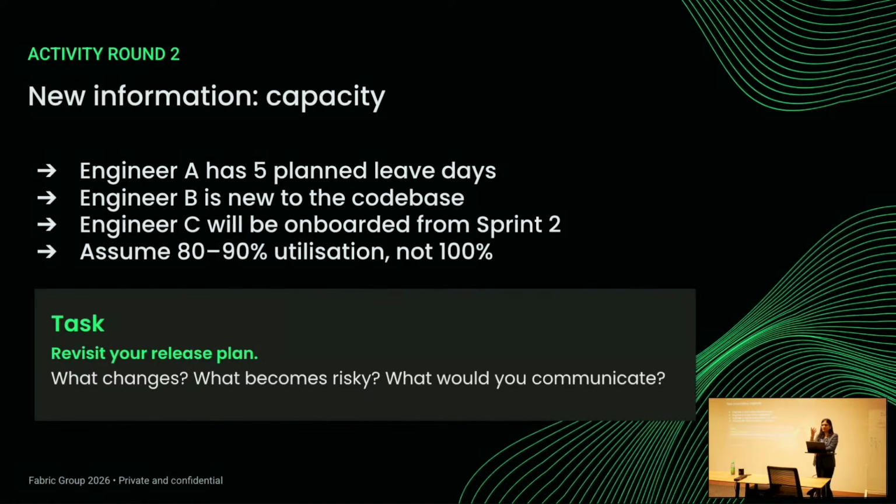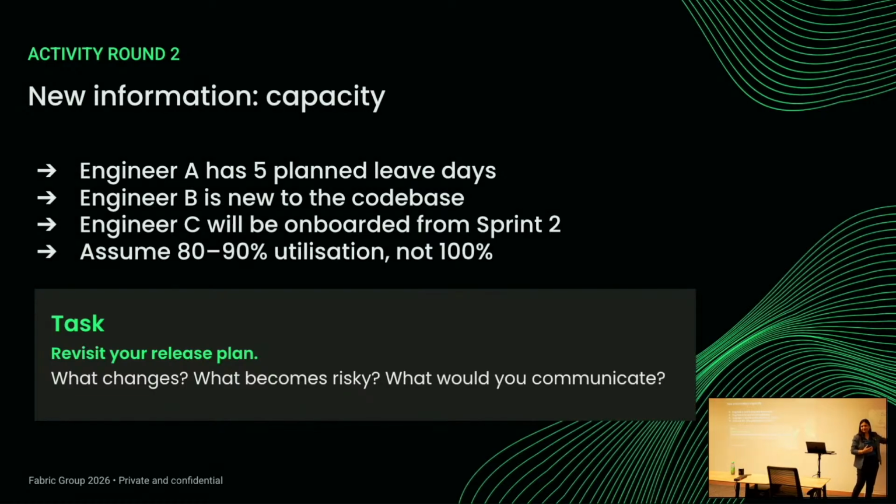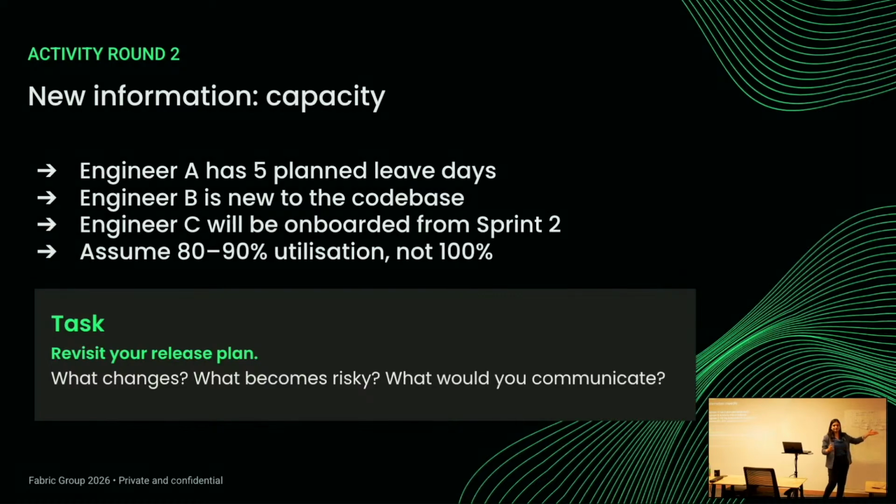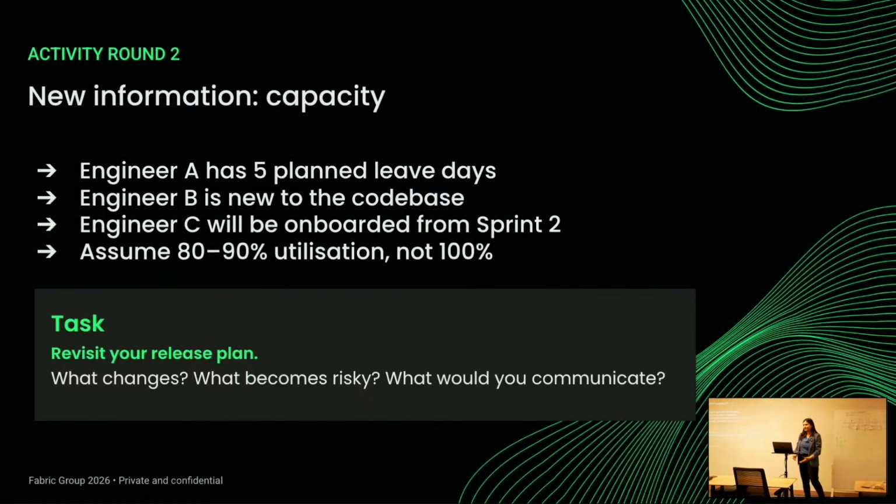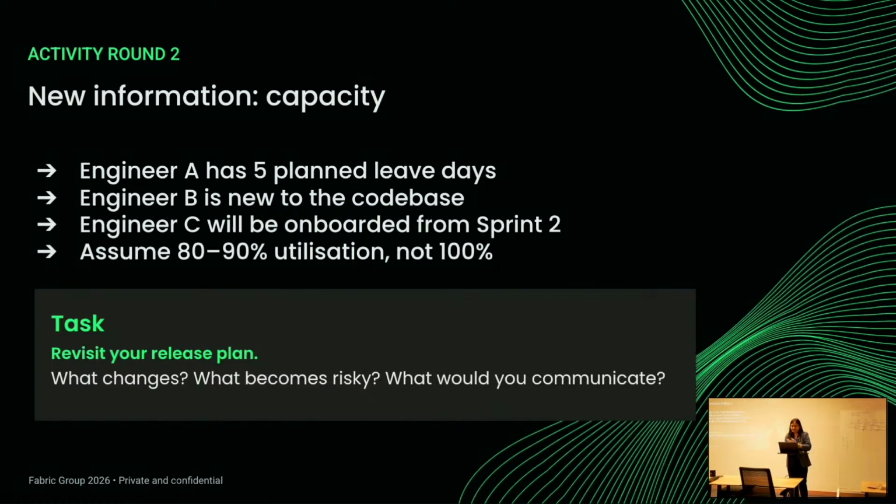In some sprints, like Chandra was mentioning, you overachieve. In some, you under deliver based on whatever you had planned. But over a period of time, it averages out if your basics are right. Those are some really great points. I'm glad that you all got a glimpse of how capacity planning changes the course of your delivery plan. Initially, team A had thought that they would deliver the whole MVP in perfect, no gaps, 3.5 sprints. Then we learned that with just one factor baked in, it's going to be about 6 sprints. That's what happens in reality.